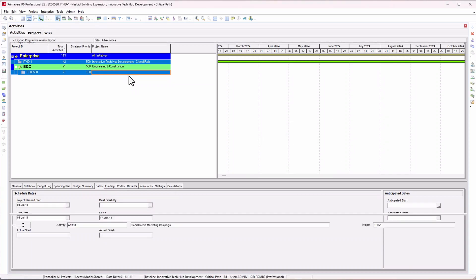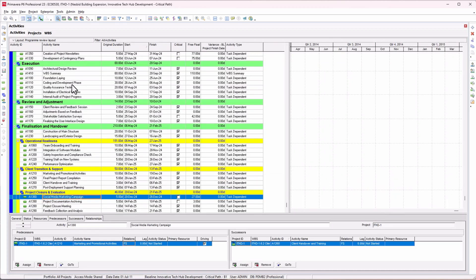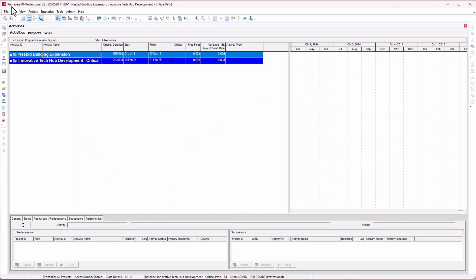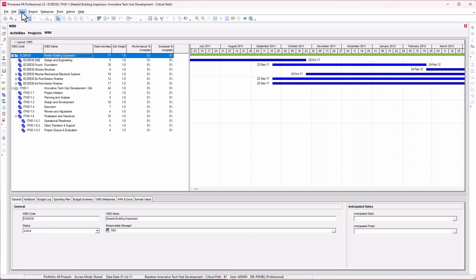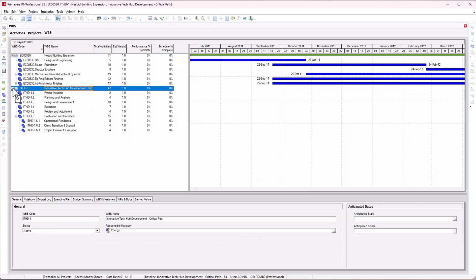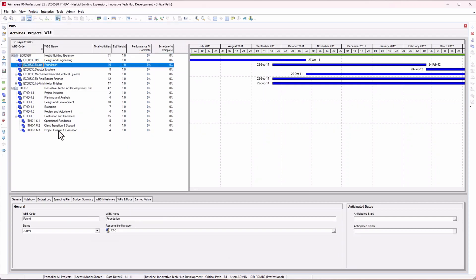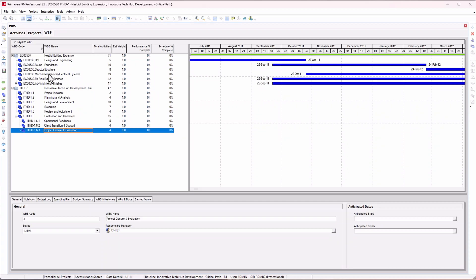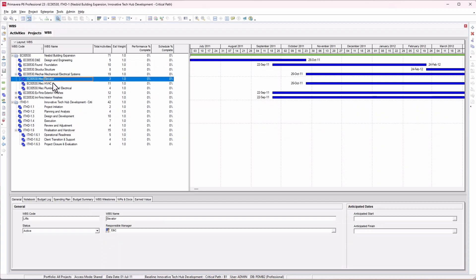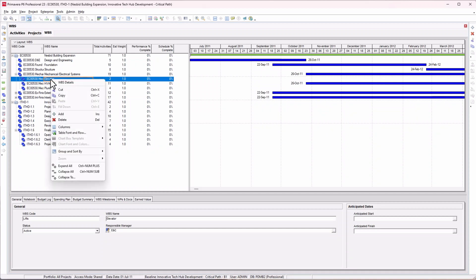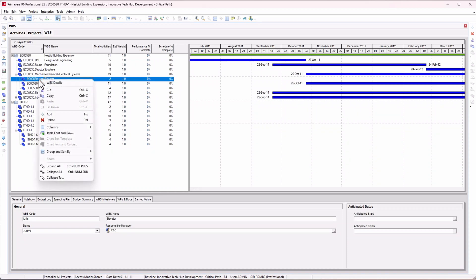When your projects are open, if you Control-minus on your computer or go to View > Collapse All, you'll see the two projects I've got. What I want to do is move a WBS or activity from one to the other. Go to your WBS tab or Project > WBS. Let's say I want to move this elevator with two activities underneath. I'll right-click and copy, go to my execution project, and paste.